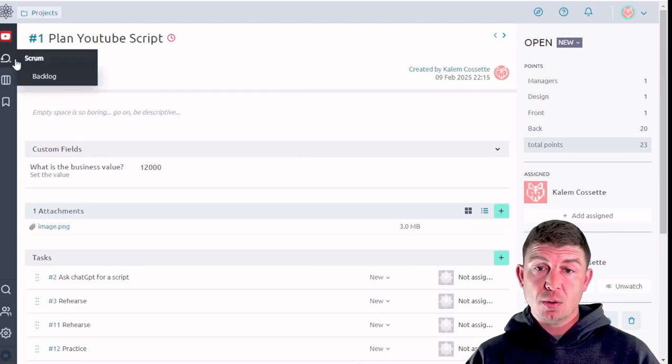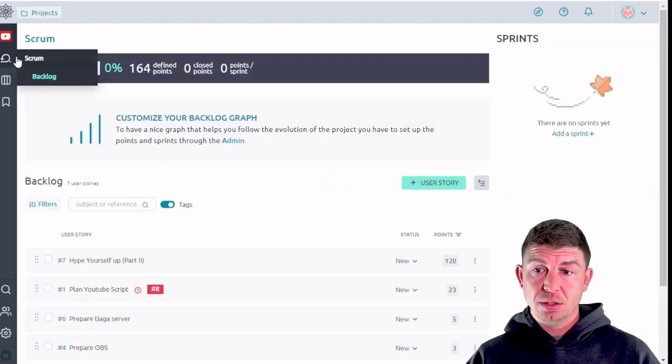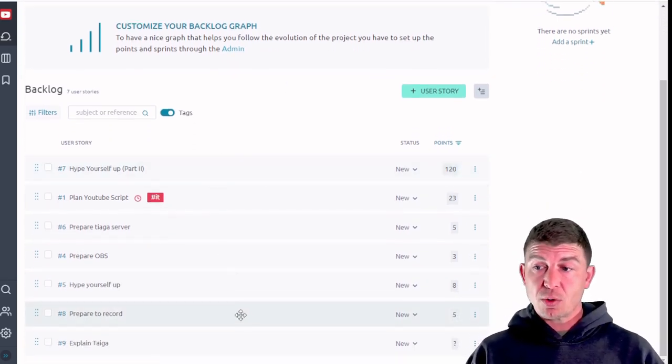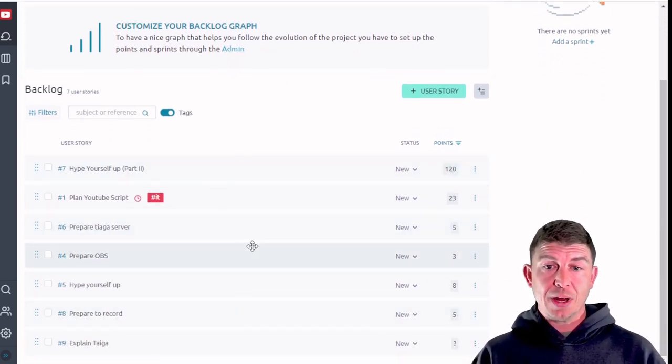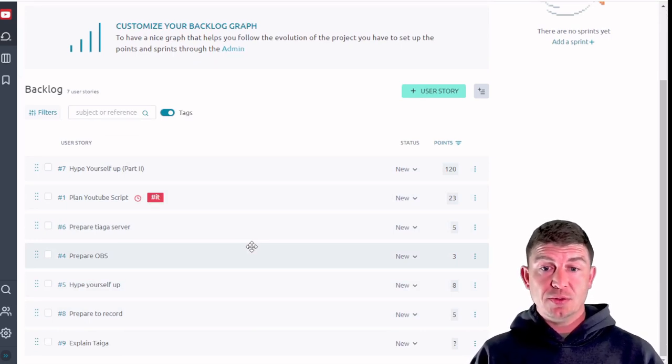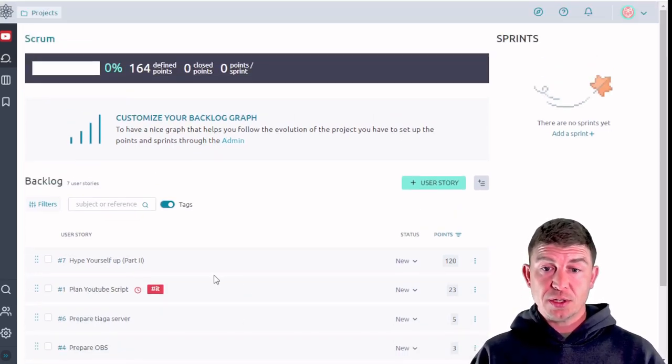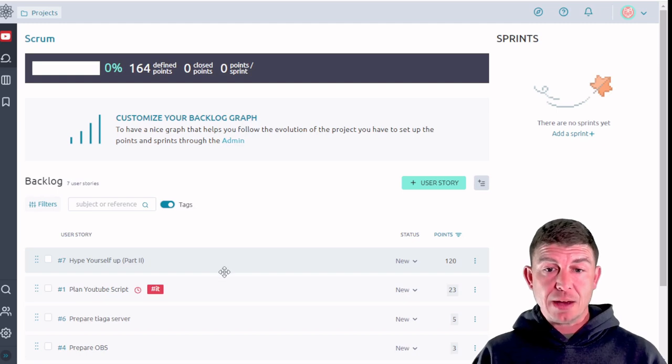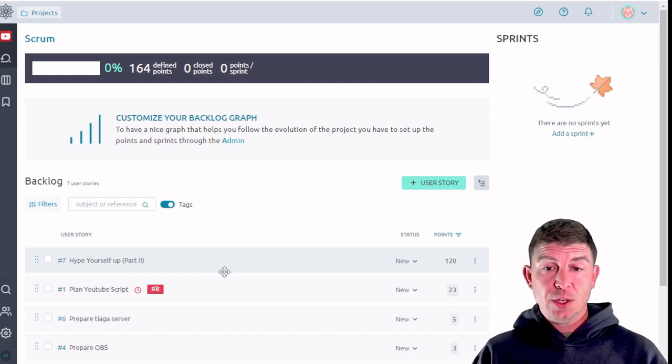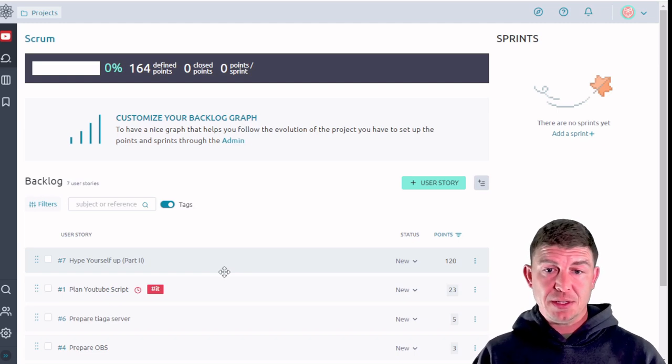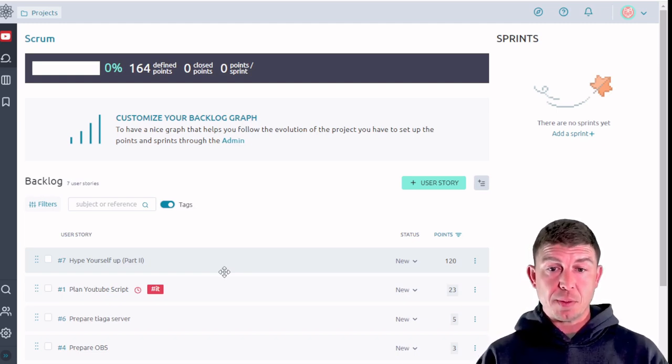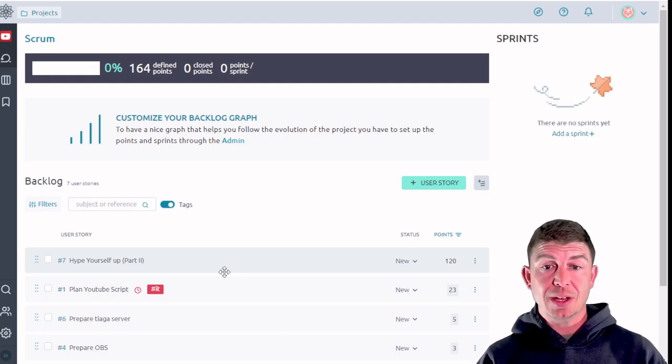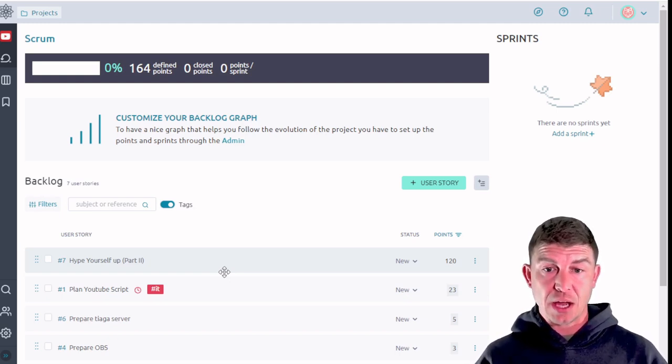So going back to the backlog. In the backlog each of these user stories is a feature request or a bug that was identified by the user base. In order to fix my product we are going to have to fix these user stories or integrate the features that were requested. We do that by adding those into a series of sprints. So each sprint is a time limited box that you put a number of items from the backlog into so that you can complete them in a set period of time.